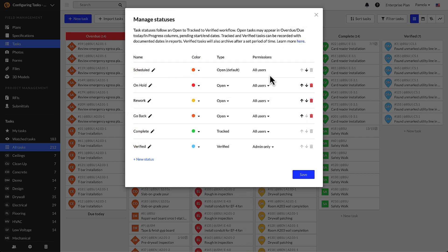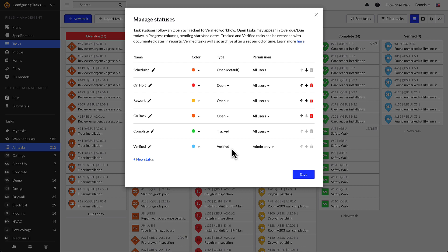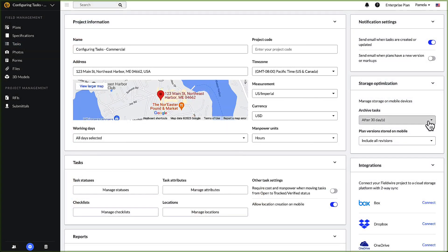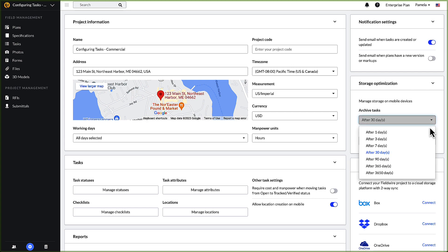Fieldwire has three different status types: open, tracked, and verified. Both tracked and verified statuses record the date a task was moved into it, so dates can be analyzed through task filters, reports, and graphs. While there can be several open and tracked statuses, you can only have a single verified status.